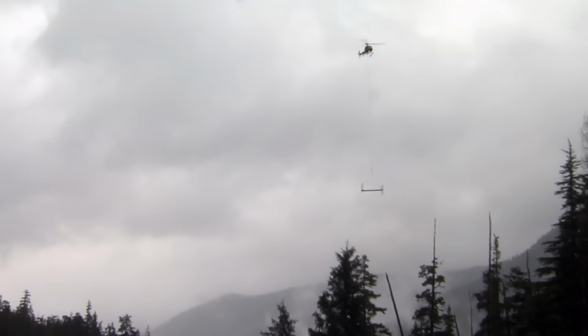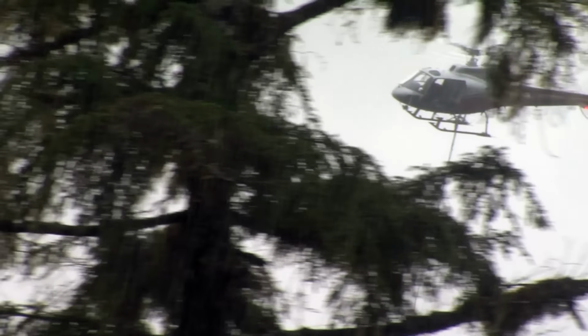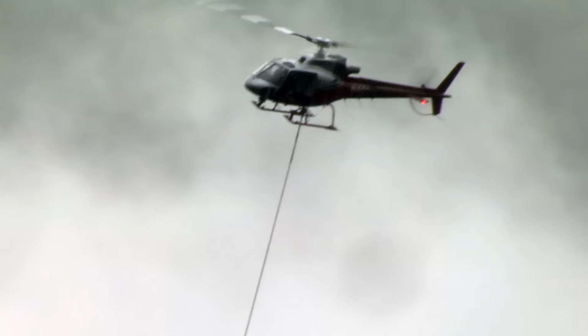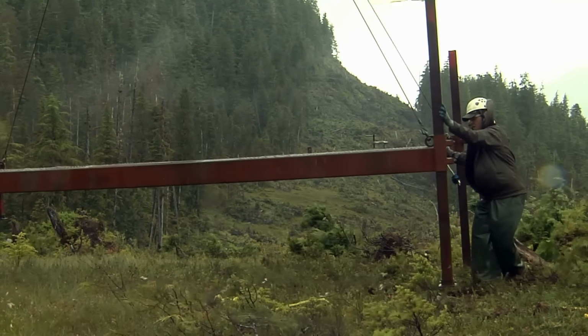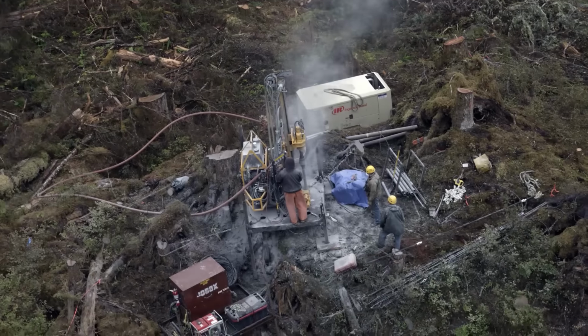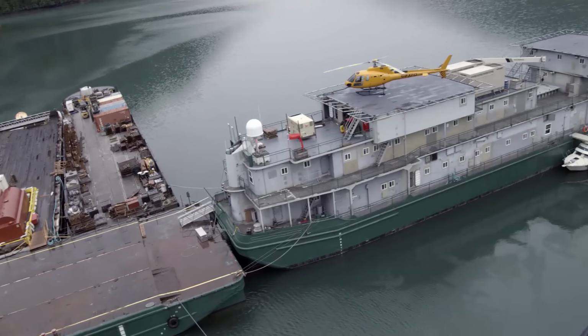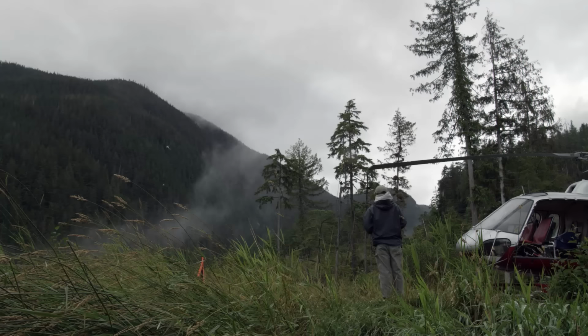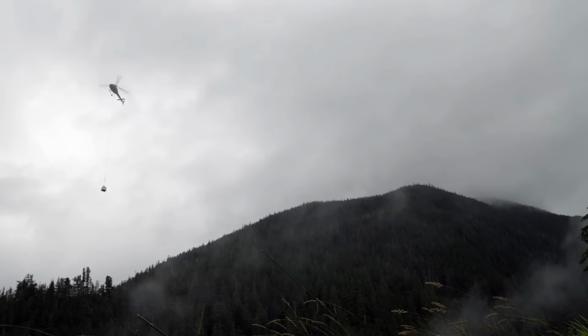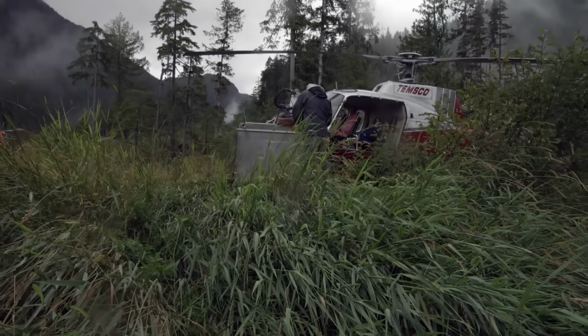August 2008. Work has progressed steadily, and now the cap crews are working high on the route at Eagle River with only a few sites left to finish Crux's part of the project. The rain as usual keeps everybody company, but the drilling keeps right on going, one day blending into the next. The only constant being the drone of the arriving and departing helicopters. Fuel is flown into pre-selected sites so that pilots can refuel more easily without having to return to the barge, saving time and money.